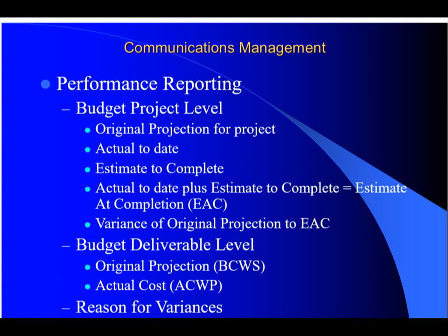And by objective, what I mean is we look at the budget: what was our original projection, what's our actual to date, estimate to complete, and estimate at completion, and then any variances. And any variances, positive or negative, should have an associated discussion on why there's a variance, giving a reason for why we're not meeting commitment as well as we would like, or to what we've originally committed to. Let's look at a couple of examples of a status report.